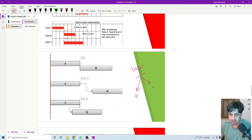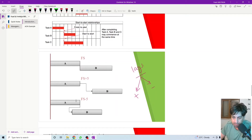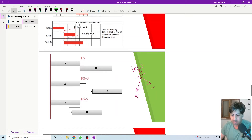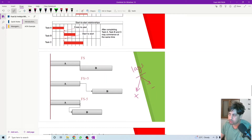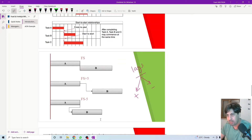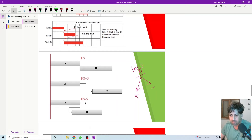For the negative lag, it means that activity B will start five days before the end of activity A. In other words, counting five days back from the end of activity A, activity B will start. So activity B starts five days before the end of activity A. This is the concept of lags between activities with this type of relationship.